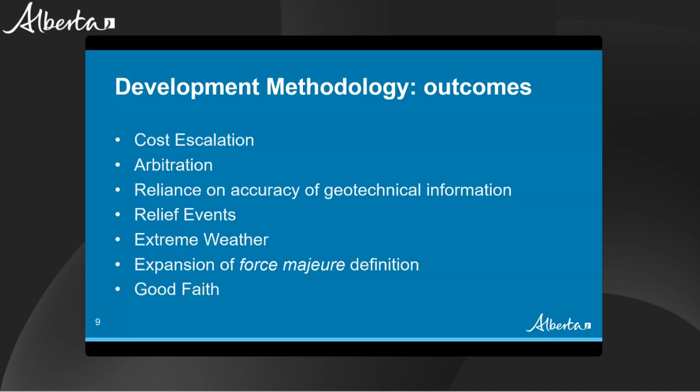Force majeure. Emerging from the pandemic, we received feedback about our force majeure definition and noted that it did not squarely address the issue of quarantine restrictions, which hopefully we will never have again. But quarantine restrictions have now been expressly added into the definition of force majeure, and the provisions have been expanded and clarified.